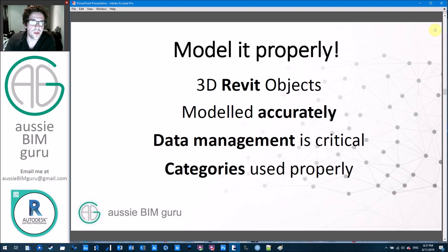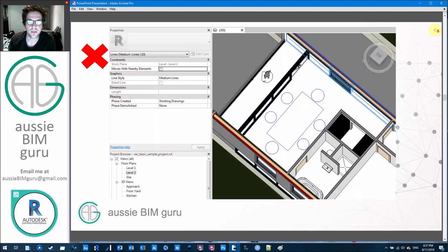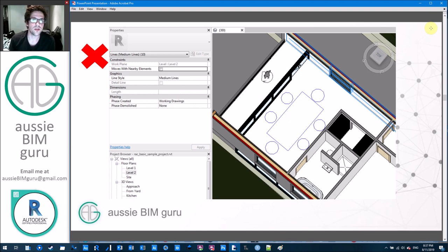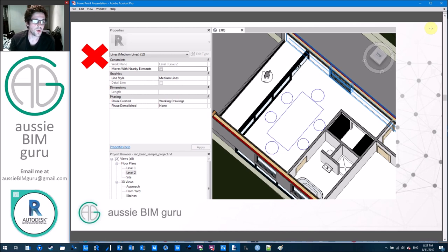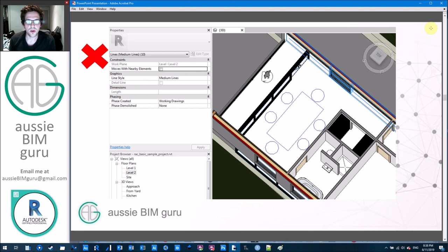Make sure you use 3D Revit families, model accurately, manage your data carefully, and use the right categories of elements for scheduling. Don't draw things in 2D or use model lines to represent things that have a cost or quantity associated with them. For example, a table added to a model as a 2D object — this can happen when people come from an AutoCAD background and don't understand the importance of quantities and type control. You're really taking away the smarts of the BIM model.